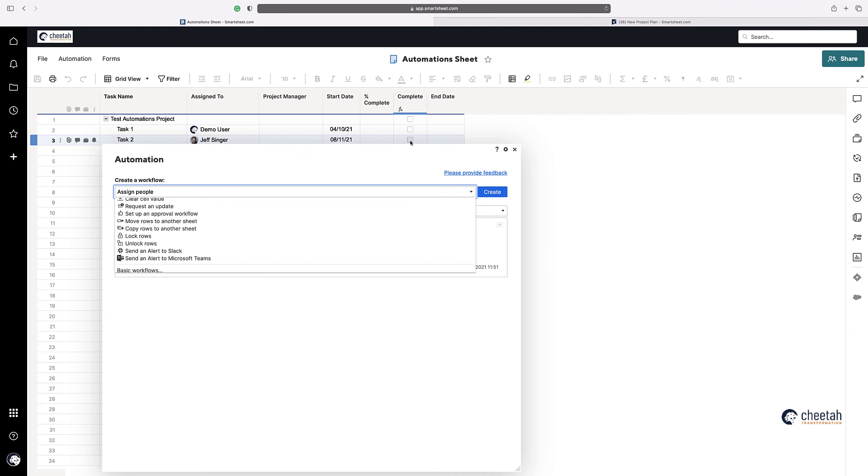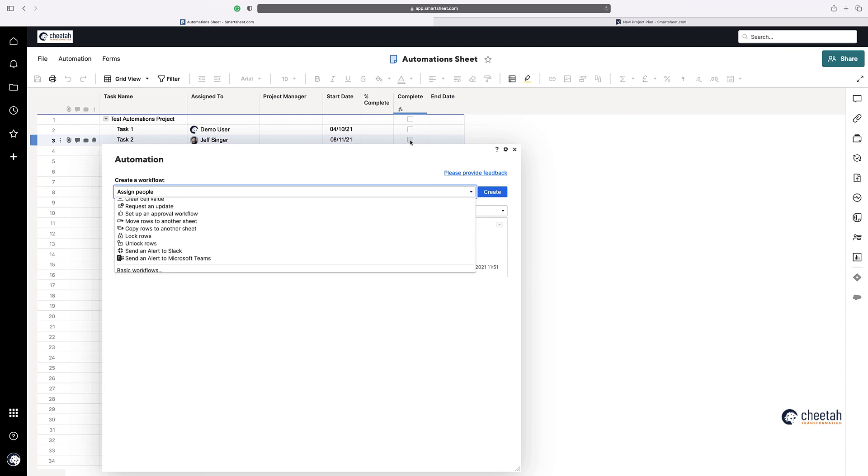So locking rows and unlocking rows. Again, very simple, normally, when an item is complete within a project plan or something and you don't want anyone else to mess around with those dates or the predecessors or the duration, you can actually lock those rows. So, again, another handy element. And depending on the conditions or the trigger that you use for lock a row, if that is no longer achieved, again, if it's this tick box that was saying, if this is ticked, then lock that row. So if this is unticked, then obviously you want to unlock that row as well. So sometimes, similar to the record a date and clear cell value, when you use a lock row cell, I normally set up an unlock row cell as well, just in case someone has done something by mistake.